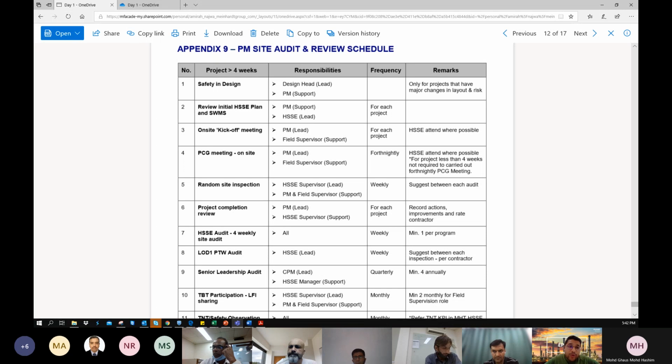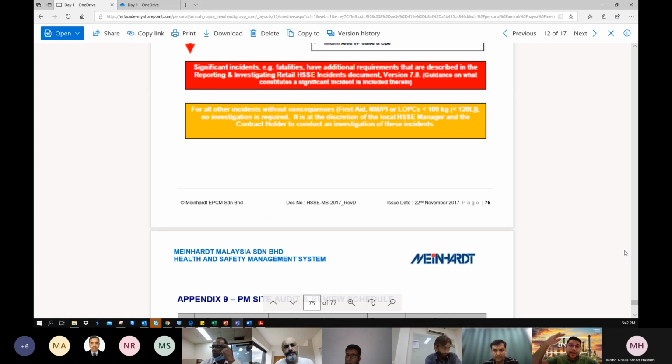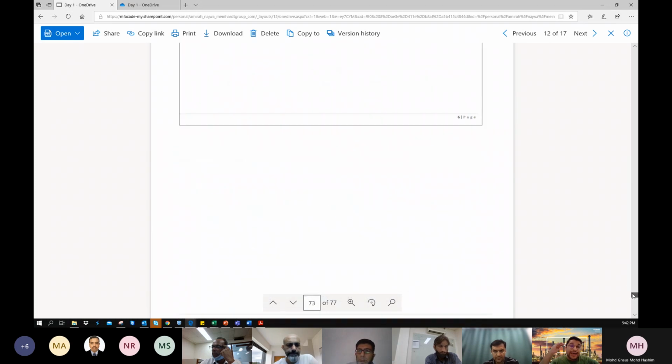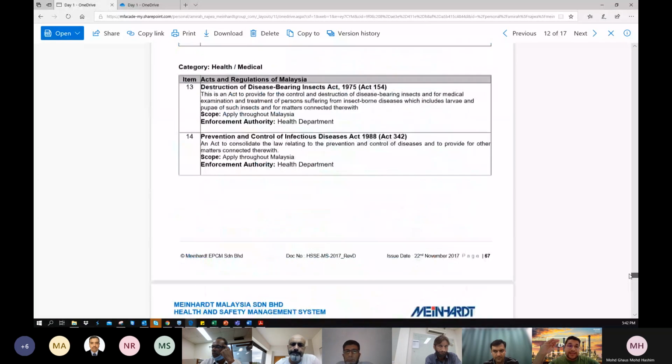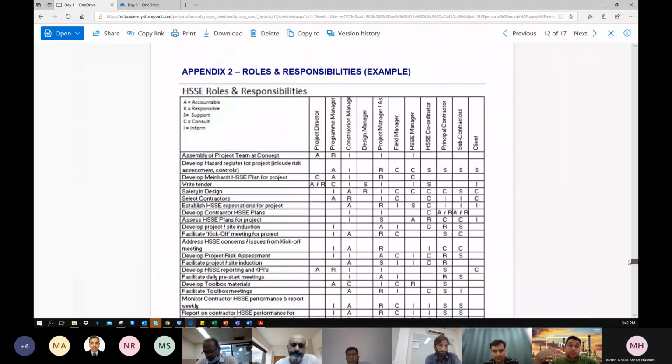So this is where, wherever possible, go on a phased approach, as I mentioned earlier. Pick the high-risk projects and high-risk activities first. Address the gaps in the high-risk contracts. Identify the high-risk contractors first, address all the gaps, and give the action plan to the contractors. Say that within the next 2 or 3 months, I would like you to close out all these actions and present back to Mindheart with the assurance that we are improving.